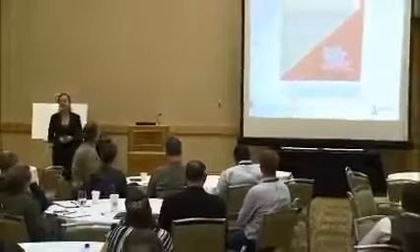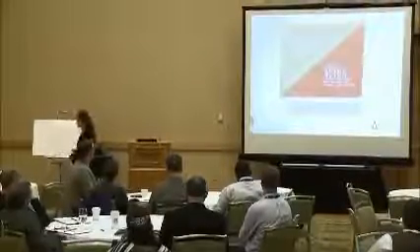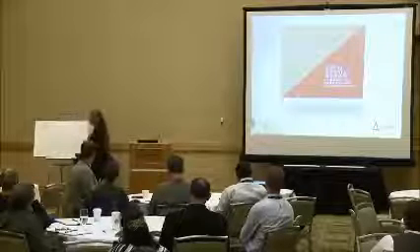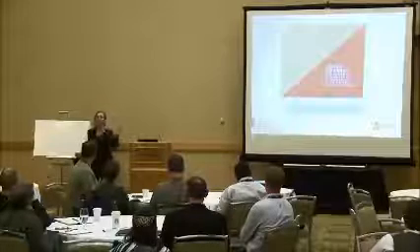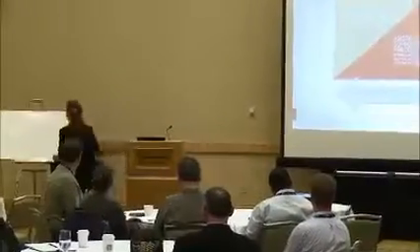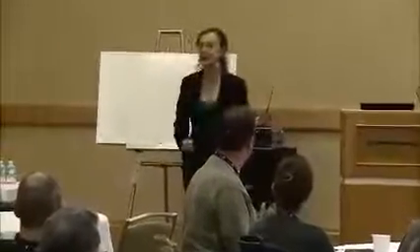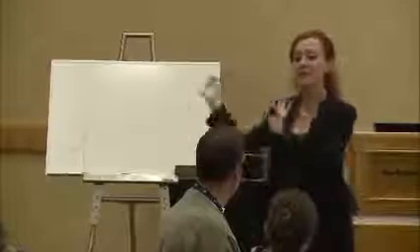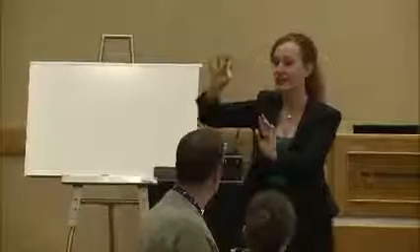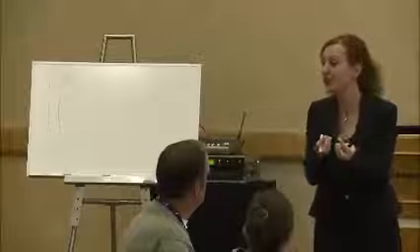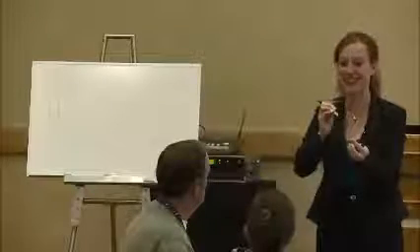And one of the things that's interesting in this, when people are looking at risk management planning, this might be a little bit difficult to see, but when you're looking at, well, how much is enough, it depends where your activity, task or function sits within that spectrum. So if it's something new and different, and it sits up here, you've never done it before, you've got this really big gap in existing supporting processes. Maybe you don't have SOPs, maybe you don't have checklists, maybe you don't have that structure, but that's where you can use the risk management process to walk you through the context, the identification, the assessment, the treatment strategies, and guess what? Those risk treatment strategies then can be pseudo procedures or structures that you can put in place to manage that type of profile.